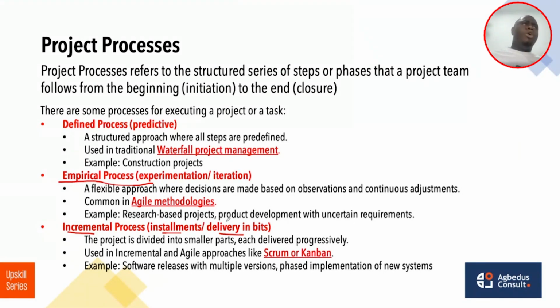So you tell them, I know we need a lot of components for my website, but I need the homepage and the admissions portal so that people can apply to my school. So they do the first part, which is the homepage. Then they do the admissions form. Then when they are done, they do the course allocation. Then they do the courses. You understand?